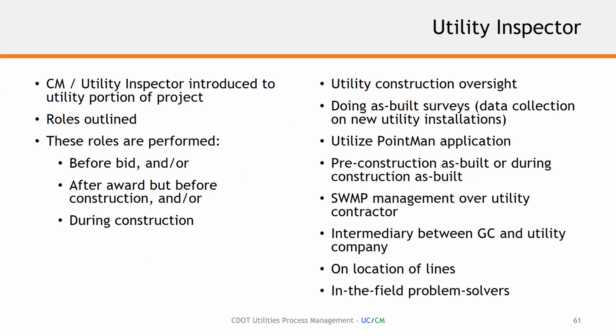So at this stage, from 90 to 100% plans, PS&E, we're looking at utility projects that may be in early relocation mode. So there is an opportunity now to bring on the construction management portion of our utility process management. And so you'll see down the bottom that now you'll see the construction management portion showing up in this phase, and also on this slide, there's a little bit of utility coordination that has to occur as well along with the construction management.